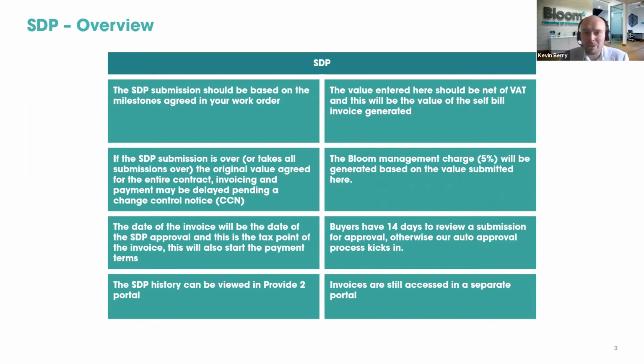Our management fee also is calculated against the fee which is submitted here, and it is based on 5% of that value that is entered in to provide to as the billable amount.